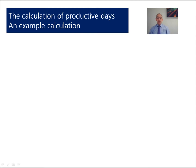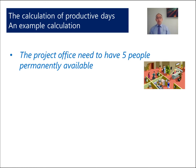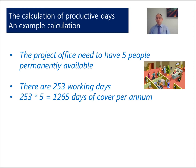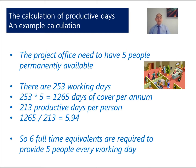We looked at the theory — now let's go through an example. We'll assume that for our project, we have a project office and we need 5 people every working day that the project office is open. So what's the calculation? Well, 253 working days times 5 people means that we need 1,265 days worth of cover each year. Now, in the calculation we saw there were 213 productive days. So we take our 1,265 and we divide it by 213 to give us 5.94 — so really, that's 6 people. We need 6 full-time equivalents to resource the project office so that for every working day, we have 5 people.